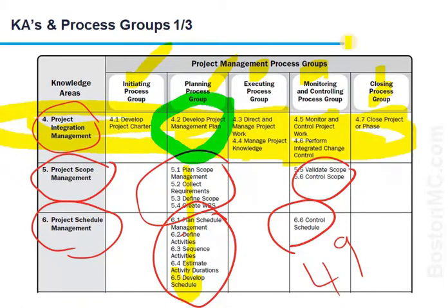It's almost like the framework of the project, and what it represents is the integration activities that a PM would have to do to pull all the pieces together. So a decision being made on a schedule needs to consider the cost effects, quality effects, the risk associated, and so on. A PM never really makes a decision without considering all aspects of the project, and that's called integration.